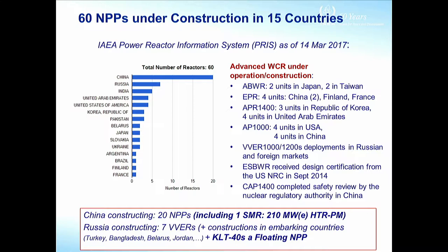The same is true for the EPR. There are four reactors under construction, but we know that in particular the ones in Finland and in France have experienced a number of problems related to being the first of a kind. They are first of a kind, so it's normal to have problems, but the problems are particularly demanding also for other specific issues. For instance, with the EPR, France was restarting constructing reactors after 20-25 years of hiatus, so of course the industry was not really ready to do that. And on top of that, for the reactor in Olkiluoto,